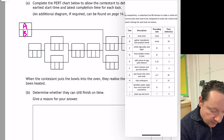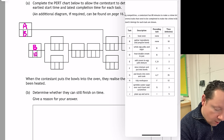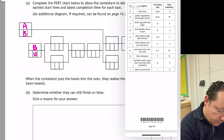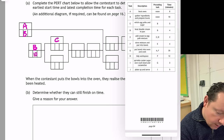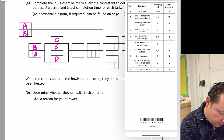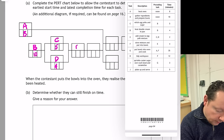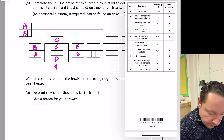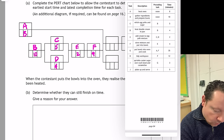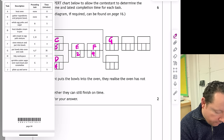At the same time, we need to gather ingredients and prepare the bowls — that's B — and that takes 10 minutes. C comes after B and takes five minutes. Also coming after B is D, which takes four minutes — they're happening simultaneously. After C and D is E, which takes two minutes. After E is F, which takes four minutes. After A and F we've got G, which takes 35 minutes. After F we've got H, which goes down and takes 12 minutes. After G we've got I, which takes three minutes, and J, which takes five.